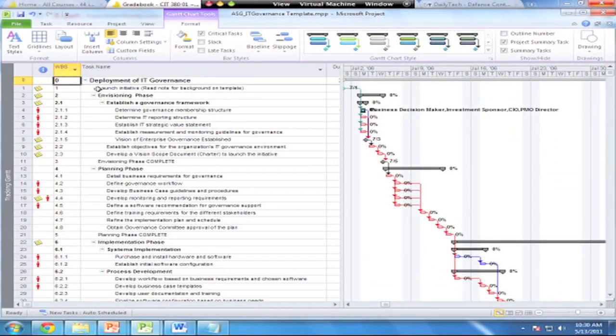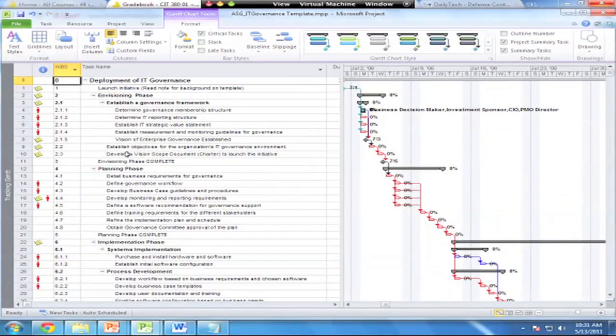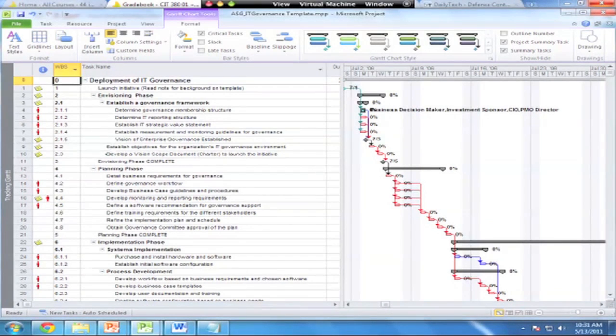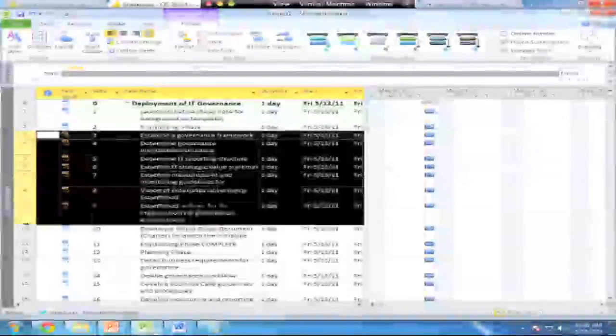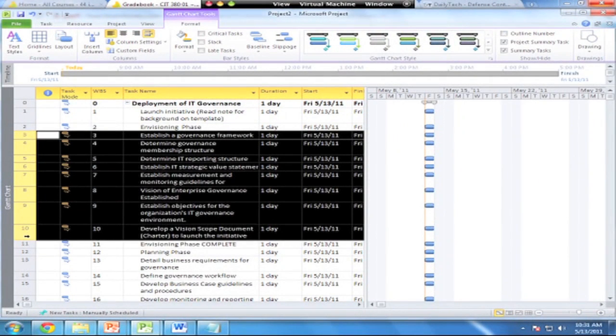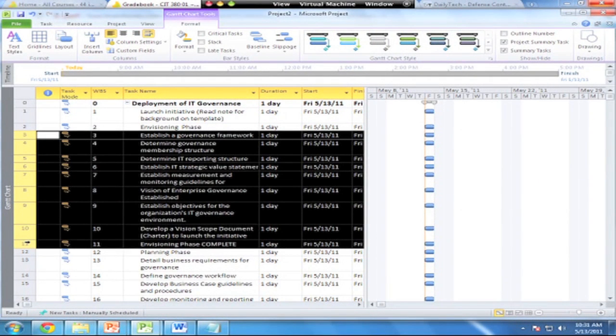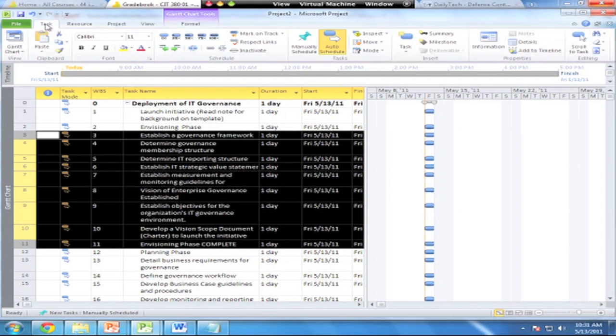I've got my title, and everything else is going to fall underneath that. On the first few tasks here, I look back at the guideline. The envisioning phase becomes the second branch on the second level. So first branch is launch initiative, second branch is envisioning phase. Down underneath the envisioning phase, we have sub-tasks that fit underneath there. I'm going to work on the indenting for these first few down to step 10. The envisioning phase goes down to step 10 or 11, envisioning phase complete. All of that fits under the envisioning phase.